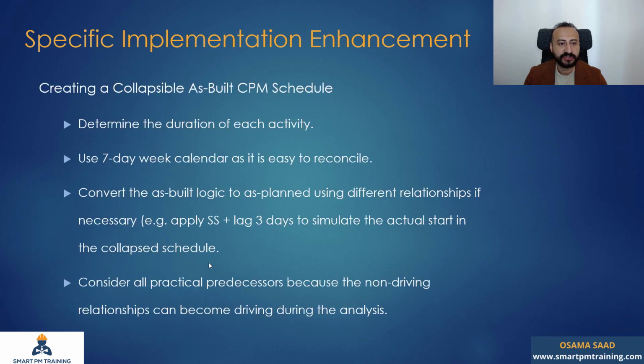Specific implementation protocol: determine the duration of each activity. You can use calendar days, so you will not go through the hassle of working calendars, so it will be easy to reconcile and do your analysis. And as I mentioned, convert the as-built logic to as-planned using different relationships if necessary. Maybe you want to use start to start with lag. If you remember, I gave one example about compaction and excavation.